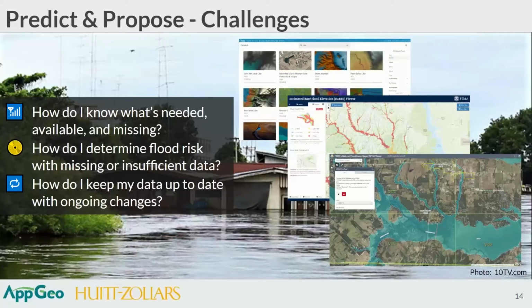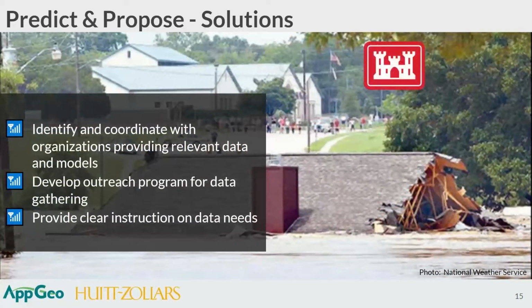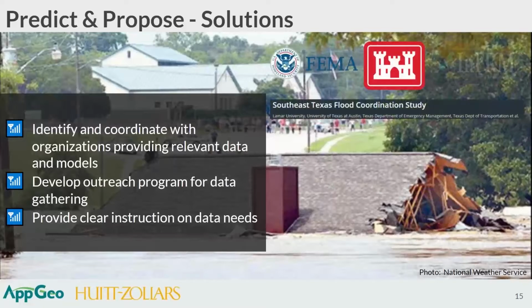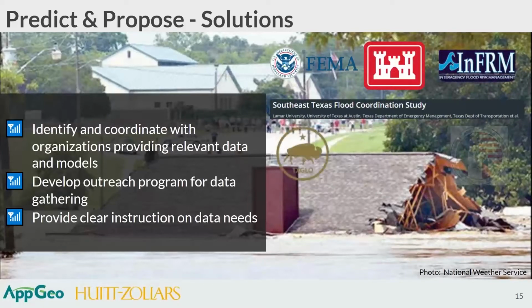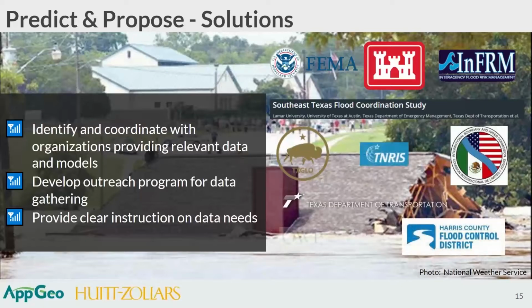So some of the solutions to those challenges, beginning with collaboration, communication, and coordination. The first step is going to be coordinating with other agencies that may have large-scale data, hydraulic models, LiDAR data, parallel ongoing modeling efforts going on within the state. One of the solutions is going to be to establish protocols for transmitting and receiving updated information from all these agencies.